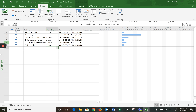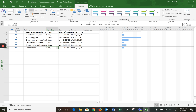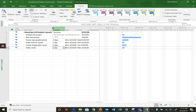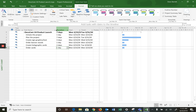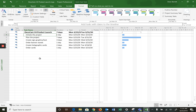There are two things I'm going to show you. One is under the Format tab — there's something called Project Summary Task. If we turn that on, it creates a summary task for the entire project automatically; you just click that box. It takes the file name as its name, but you can change it — for example to 'Launch a project' if you wanted.